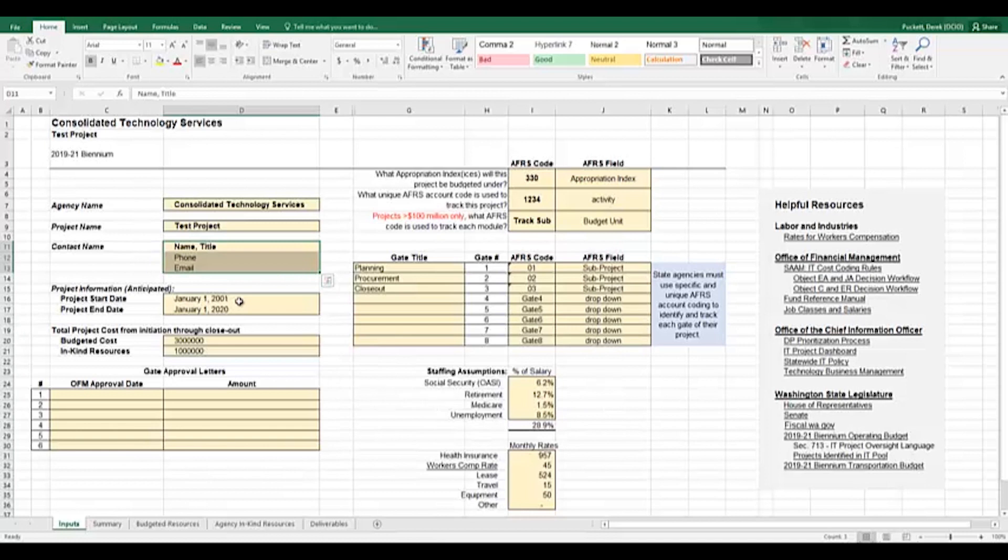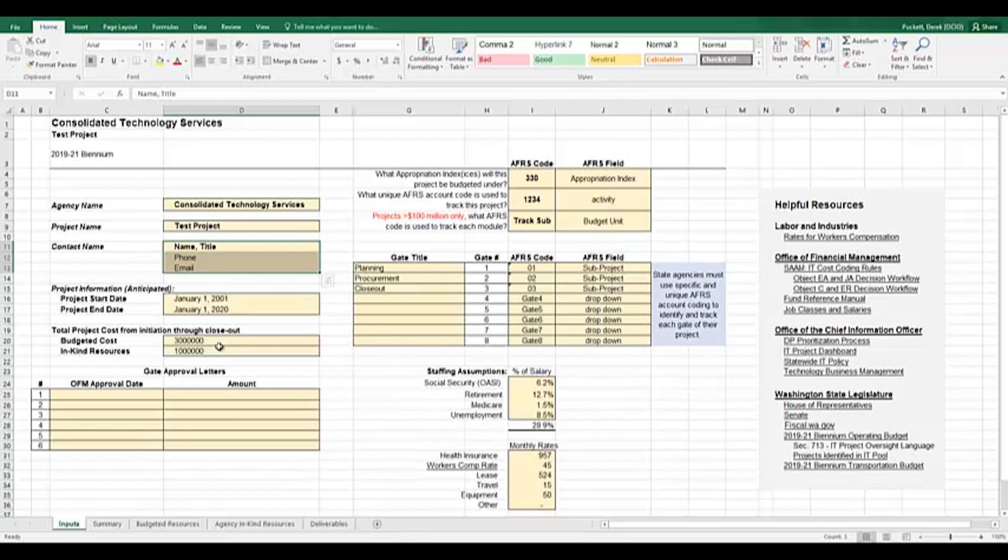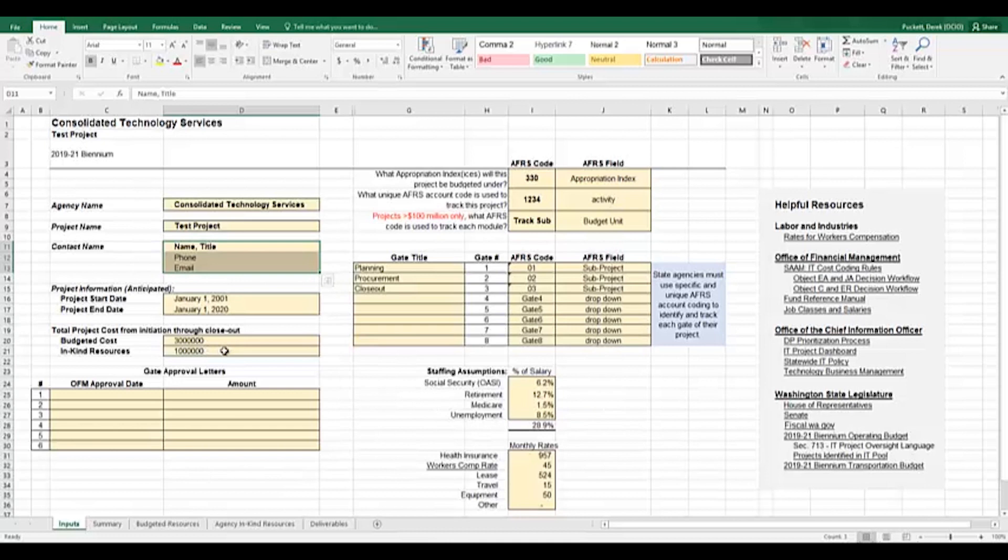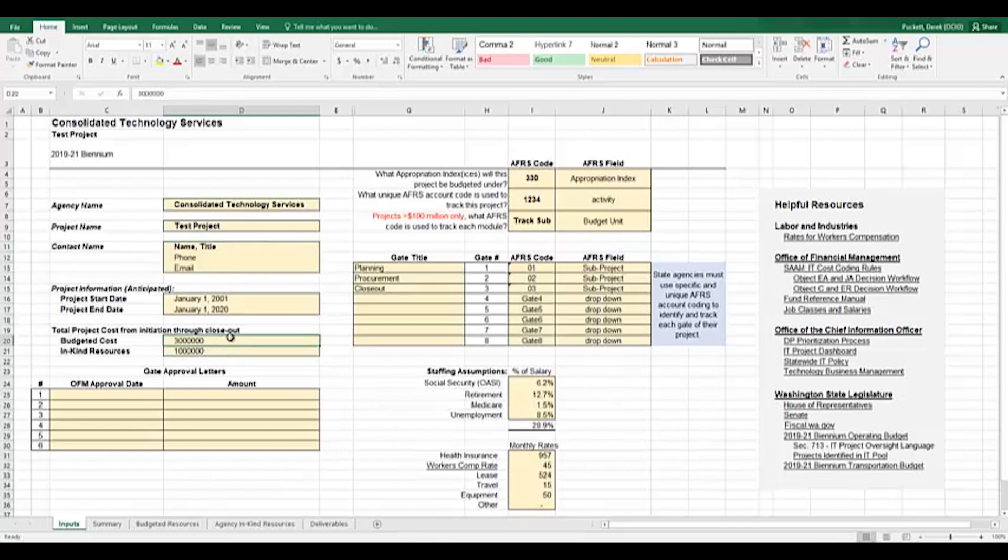In cells D16 and D17, you will input your project start and end dates. In cells D20 and D21, you will input the total project costs from initiation through closeout. These values should represent the total project estimates as accurately as the project knows them at the time that the technology budget is developed. A reminder again that this is a frequently updated document and should reflect accurate costs as time goes on. When filling out this section, projects should include both budgeted costs approved in the budget and anticipated in-kind resource costs as well.